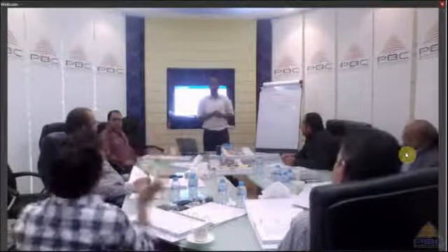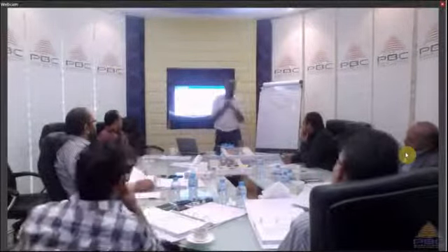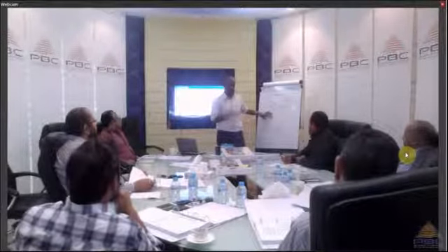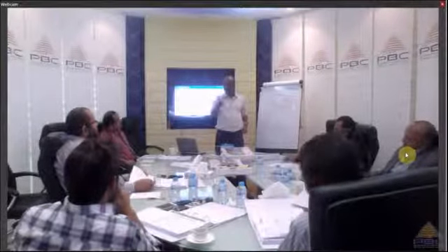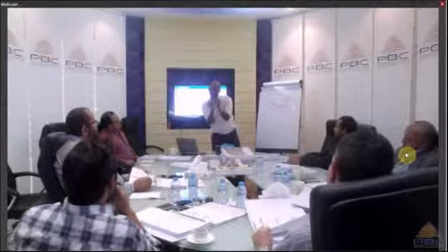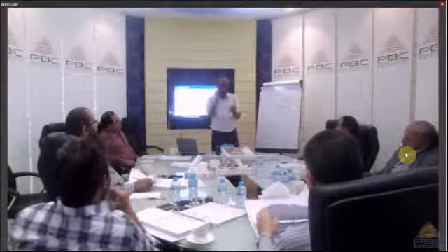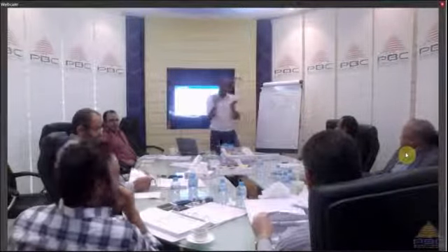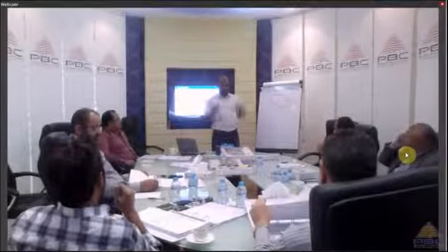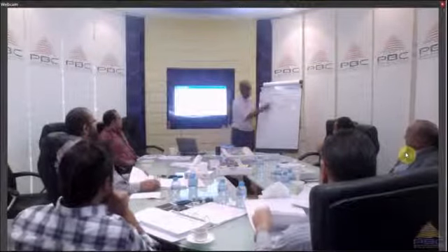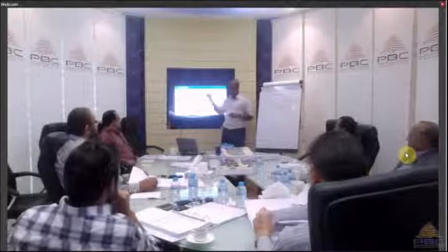Has to be clarified. Exactly. And these are the components to help us into locking the scope. So whenever something happens, say no, outside the scope. Okay? If you keep accepting little requests from the client, can you please just change this a little bit? It won't affect anything. Please just do this. Okay? We're gonna do that, right? But then suddenly it has bam. Okay? So you have to manage this very well. You have to manage your borders very well. Okay? So these are called exclusions. It's part of the scope statement document.